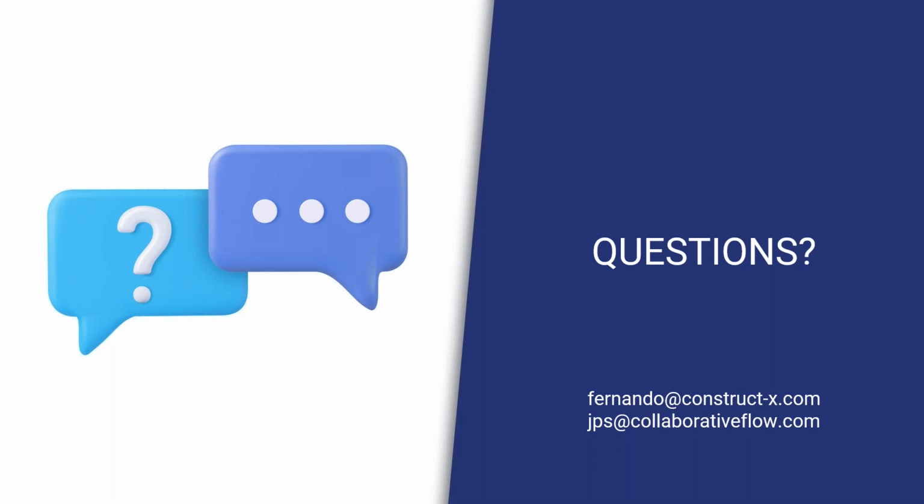So let's go to another question. We got a comment here: fully agree with EWPs, CWPs, and IWPs. Unfortunately, today's projects are essentially driven by unrealistic schedules. Engineering is typically just in time with limited vendor data until we ensure everyone understands how long it takes to actually get reliable vendor information. The CWPs will always be half-baked, right? Without vendor information, absolutely CWPs will be half-baked.